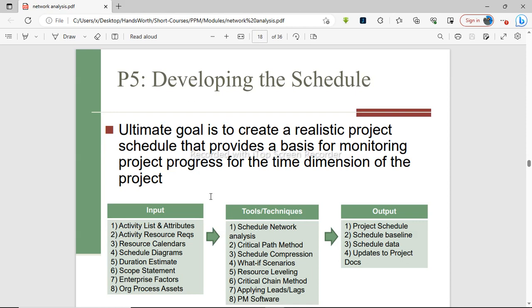Apart from that, you can also see resources, to say this given activity requires this amount of resources. But then when you go on the ground to counter check and you find that those resources are not available, as a project manager you can know that there is a need for these resources, otherwise it will stunt or hold the project from progressing.